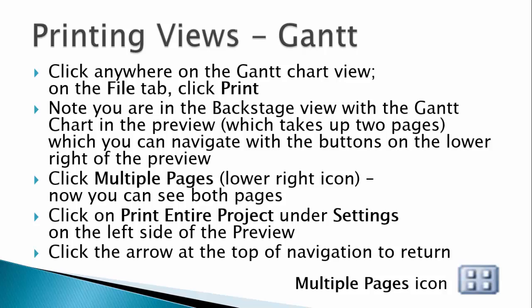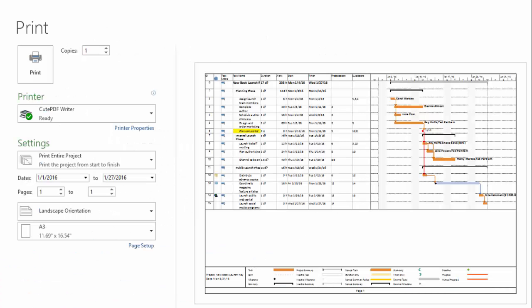We'll use the backstage view to see the printing options. However, unless you have a PDF writer I don't recommend actually printing anything. Depending on your PDF writer when you drop down the lower print drop-down showing paper size you will see indicators of supported sizes. Choosing A3 with Qt PDF writer should help you produce a PDF that includes the entire entry table and Gantt chart on a single page.